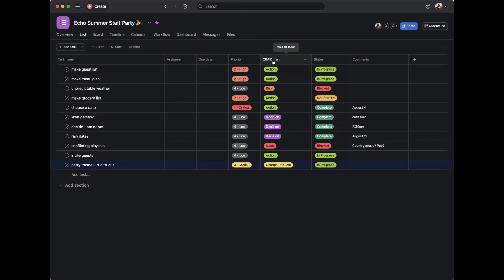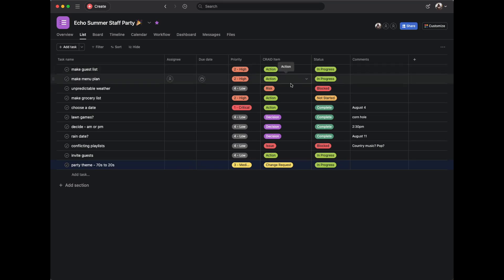We've decided we want to know the priority of these items and what type of CRAID item it is. CRAID stands for Change Request, Risk, Action, Issue, and Decisions — a really fantastic way to keep track of not just to-dos, but also risks that might become issues, changes that have happened, decisions that have been made, and all the data that goes into a project.